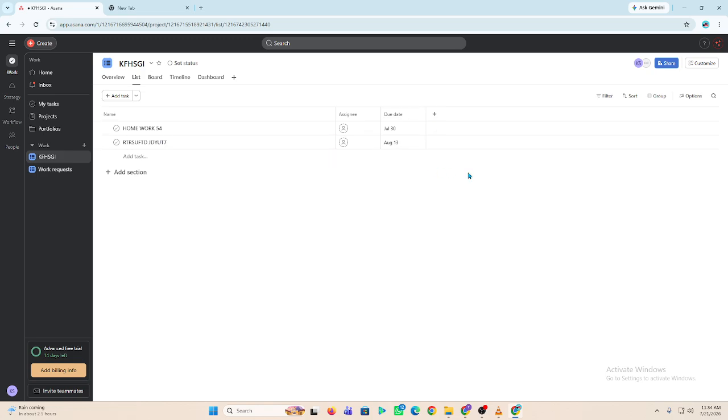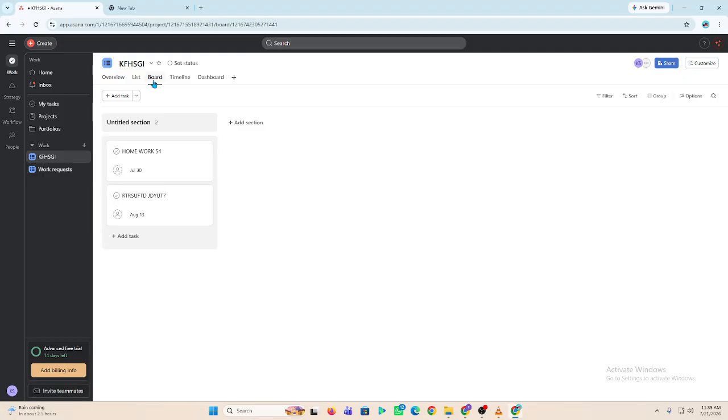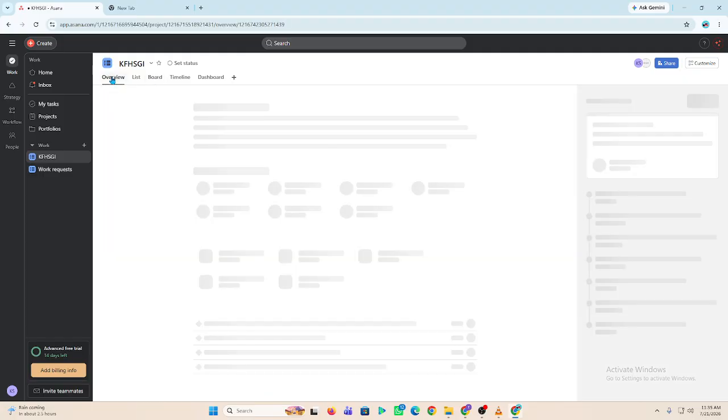Now you'll see all your tasks displayed across a visual timeline. Each task appears as a bar based on its start date and due date. After that, drag the ends of a taskbar to adjust its schedule, or drag the entire bar to move the task to different dates. So if your tasks depend on one another, create task dependencies by linking related tasks.